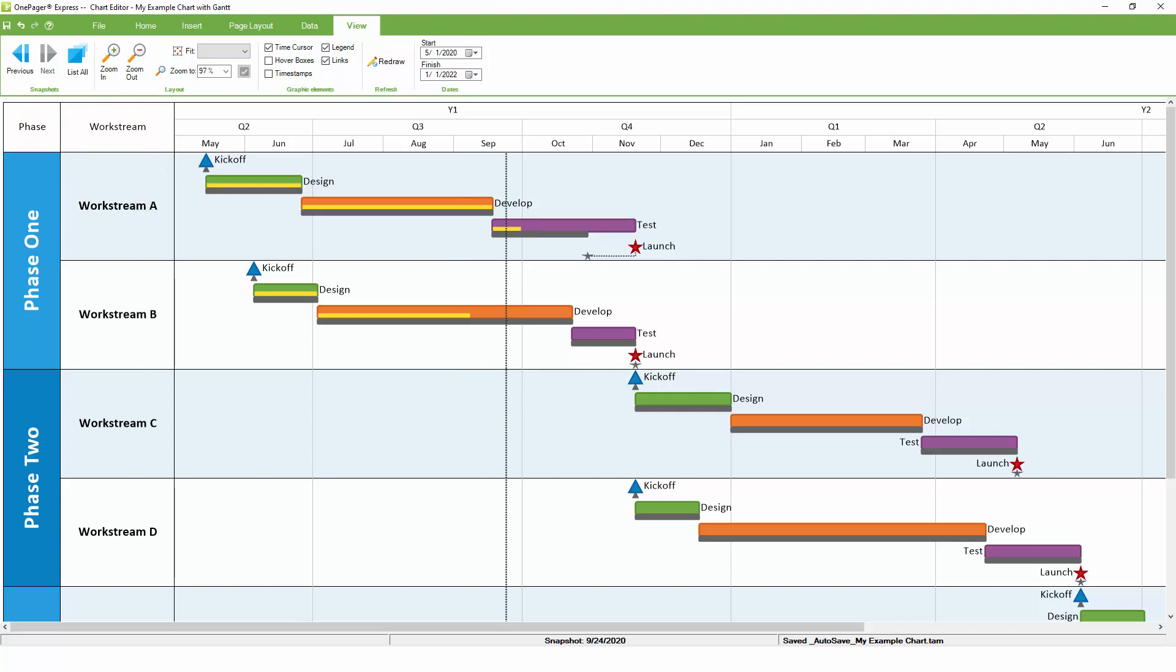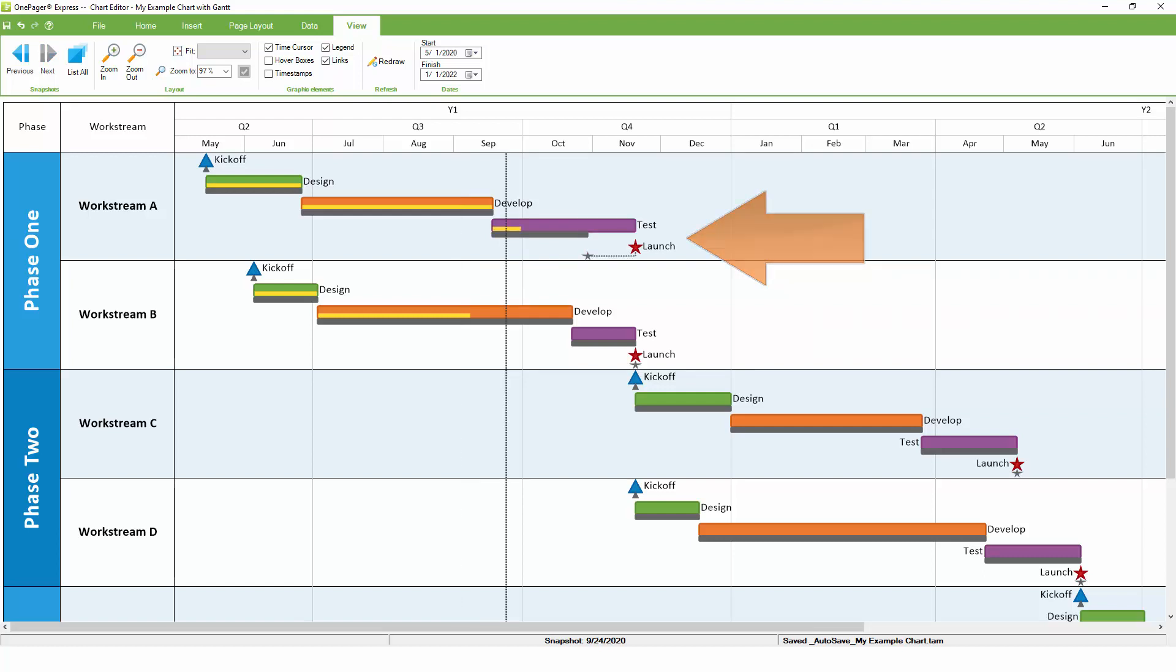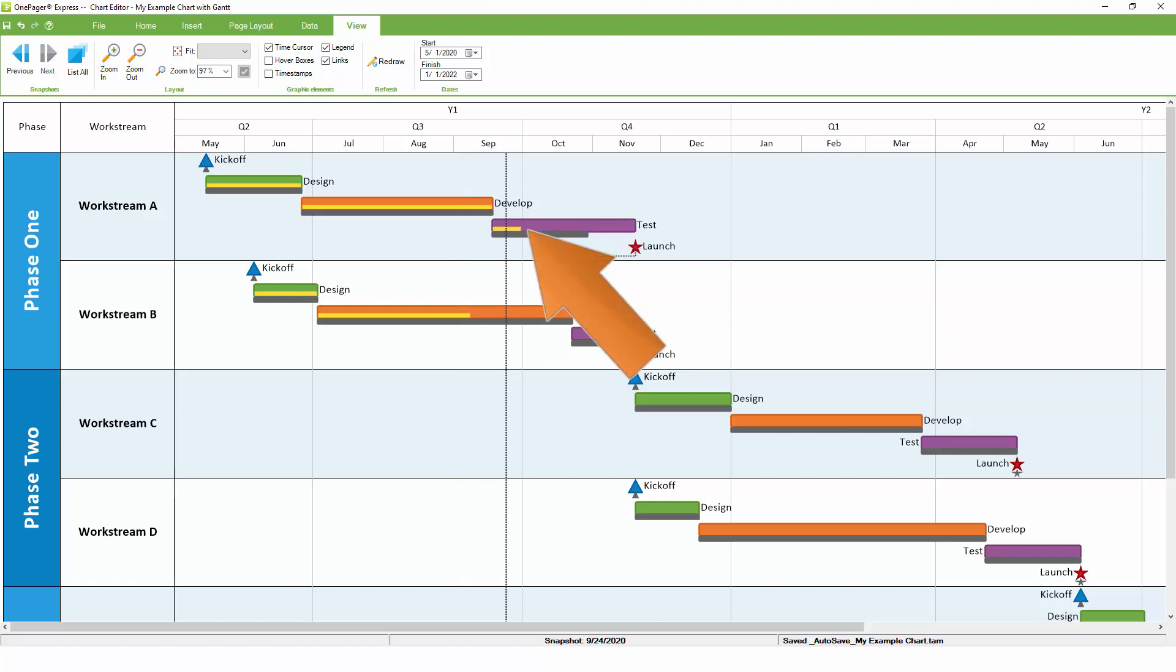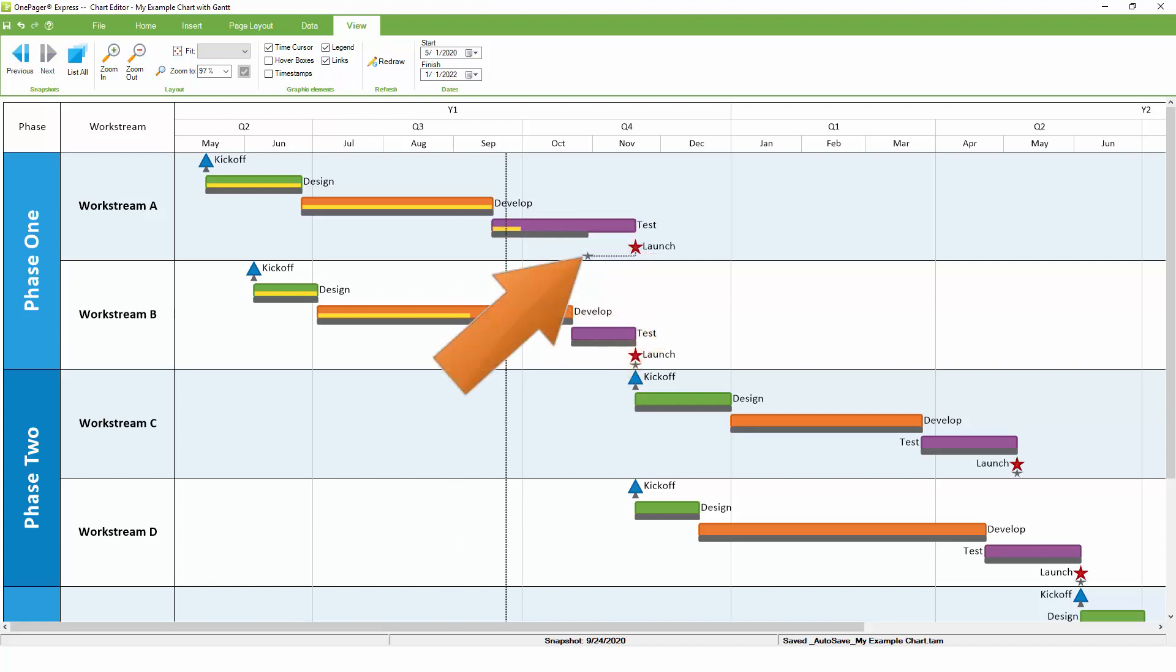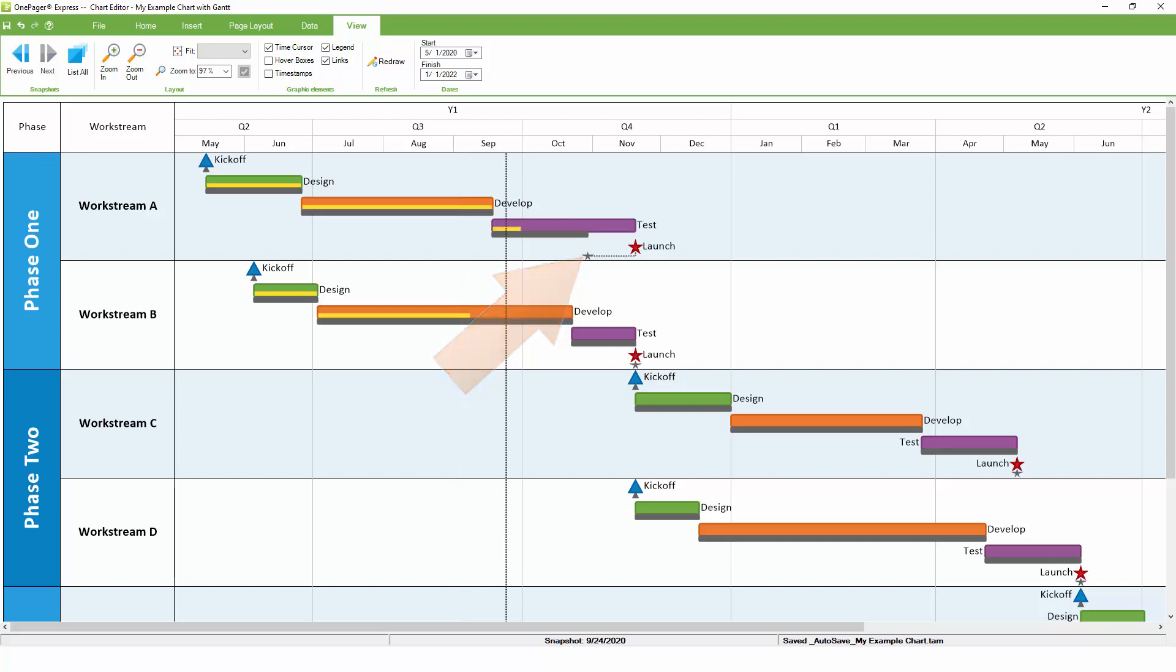As we flip back and forth between these two snapshots, notice the animation that takes place in the chart. The tasks themselves are moving left and right because they are tied to the dates in Excel. The percent complete bars, shown here in yellow, also change as the project changes. The baselines, if you're tracking them in Excel, don't move. They stay put, which gives you a good sense for your original plan compared to the current state of the project.